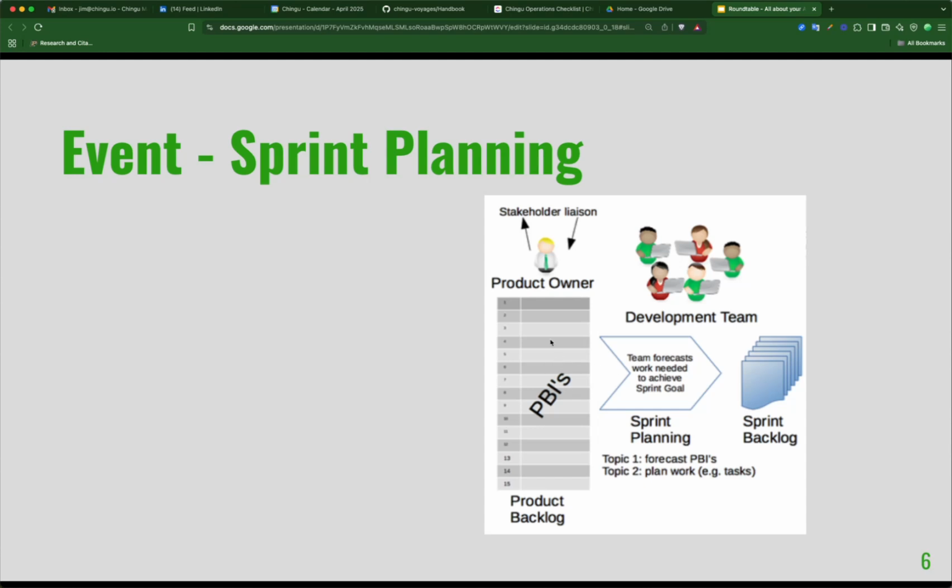And so what you'll do is you'll identify those, you'll create a sprint backlog with just those items in it, and then members of the team, the development team, will volunteer to complete those items. So that's essentially the process you go through. And there's a lot of nuances. There's a lot of different techniques you can use to get from this point to the sprint backlog. But what we're going to focus on is just the responsibilities.